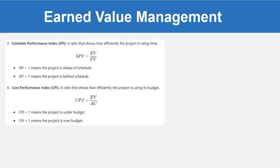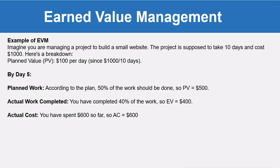Now let's look at a simple example of EVM. Imagine you are managing a project to build a small website. The project is supposed to take 10 days and cost is $1,000. So the planned value per day is $100, since $1,000 divided by 10 equals $100.